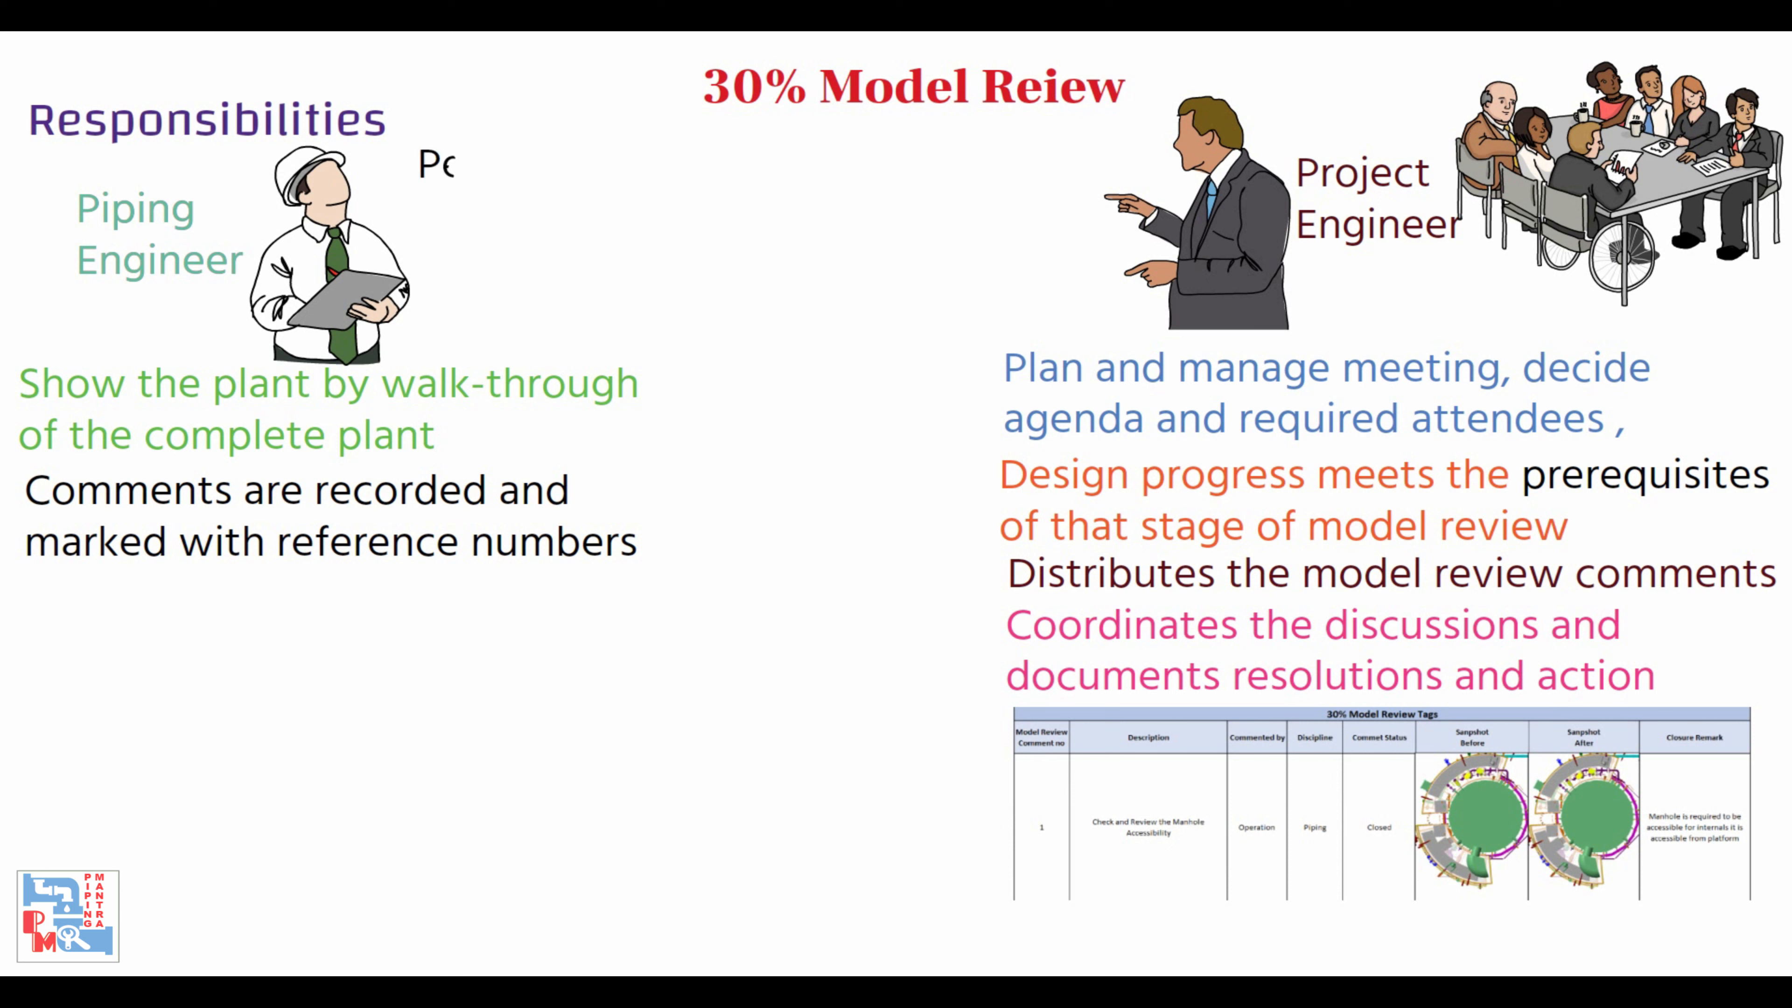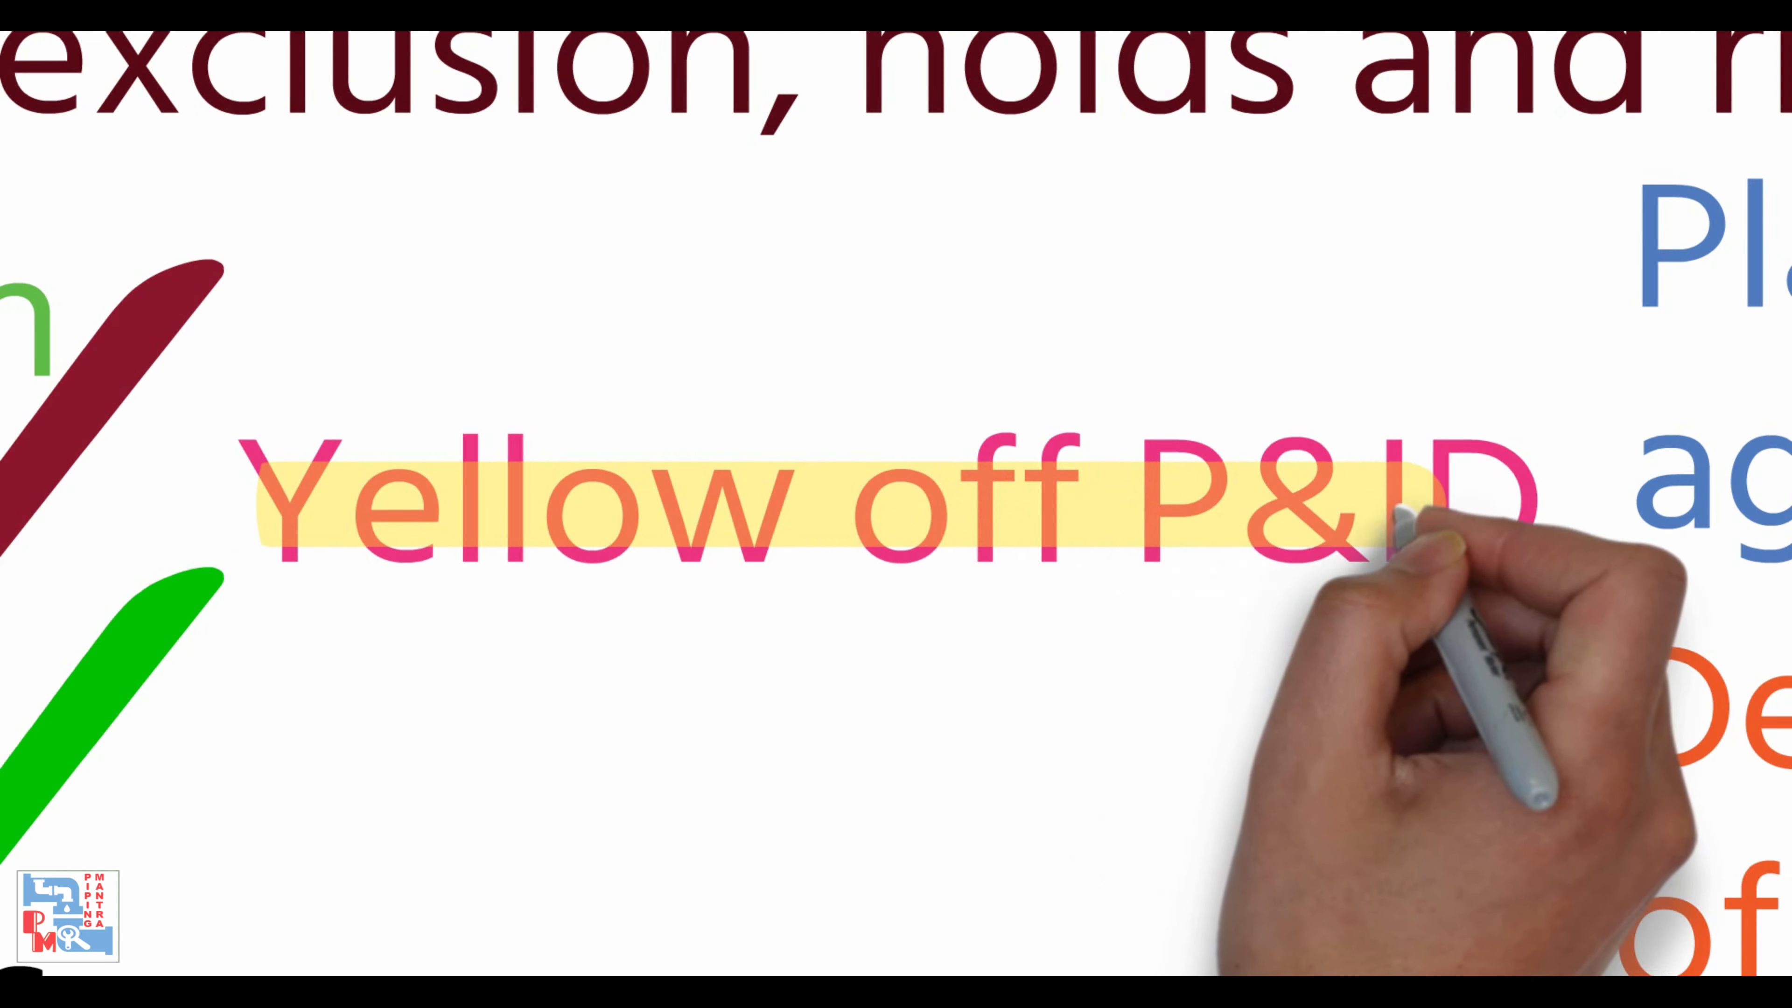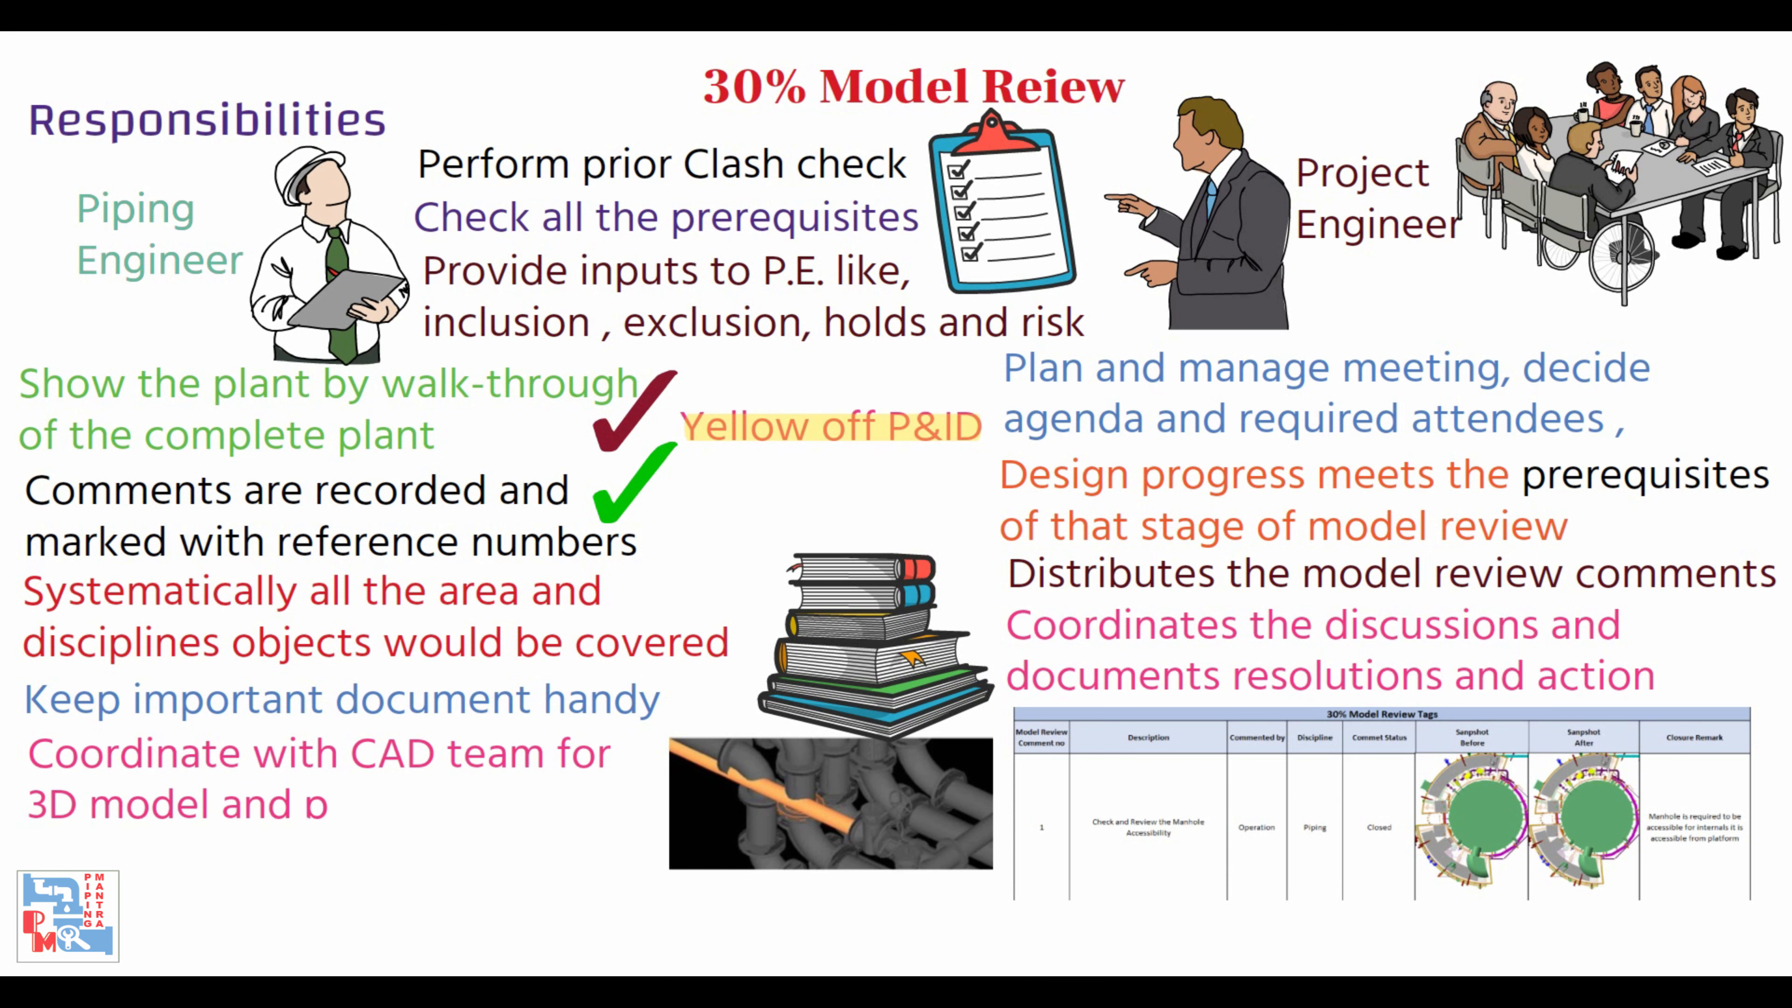The piping engineer will drive 3D model, perform prior class check, check all the prerequisites, provide inputs to the project engineer like inclusion, exclusion, holds and risk based on unavailability of data. Capture all the comments in the form of tags or action items along with the snapshot of the model. Plan model walkthrough in an intelligent manner so that systematically all the area and discipline objects would be covered. Yellow off P&IDs—that is, the lines that are part of 30% model review. Keep important documents handy, coordinate with the CAD team for the 3D model and plan its cutoff date.